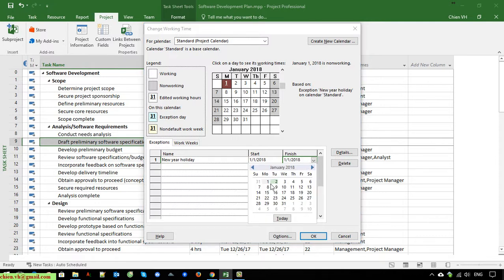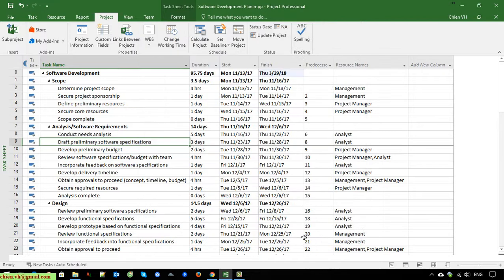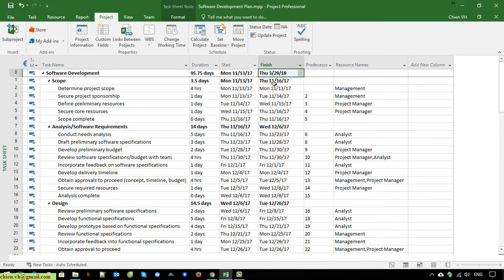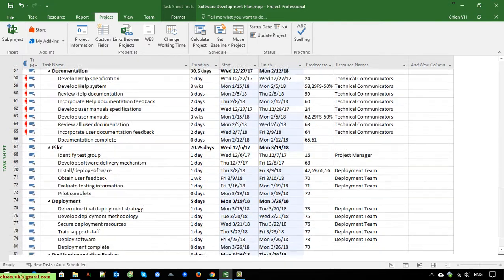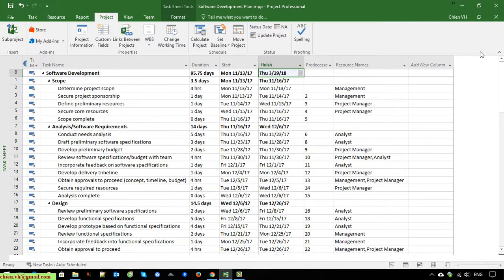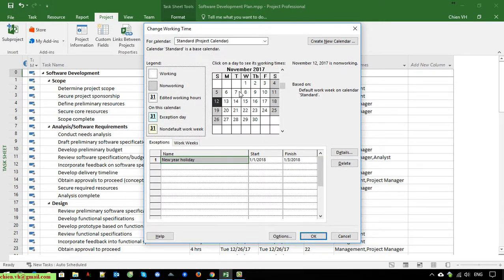For example, New Year will be off work on the first, second, and third. We will select the finish as the third. Now the project end date has been increased to the 29th. We are able to add multiple holidays in the project during the development time.